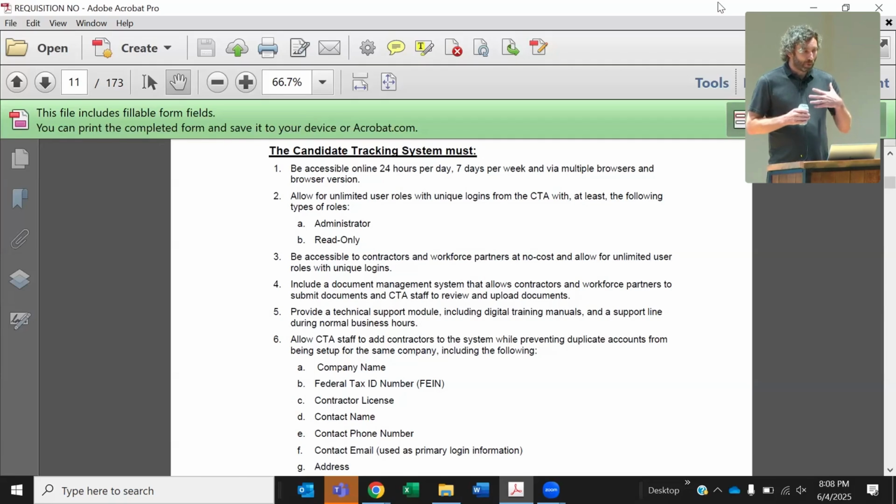And if I'm putting a project out at my office, I will get input from other engineering firms. I will look at past performance, past history of similar work, and then I'll just look at price sheets and hourly rates of local engineering firms. I have price sheets for everybody, essentially. And these days, a principal engineer, civil engineer, is about $450 an hour, fully burdened. That's with the profit and overhead. So just start adding meetings up, and it gets expensive, very expensive.